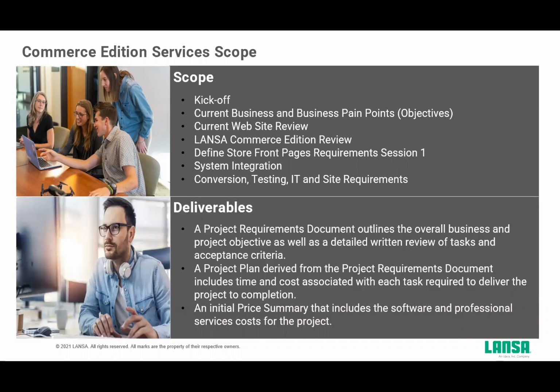The deliverables out of this are a project requirements document, a project plan based on this initial scope, and then an initial price summary, not so much a quote, because this is just a two-day scoping exercise. It takes into account all the e-commerce site deliverables that we need to put in, and the products that are required, LANSA Integrator or Visual LANSA.